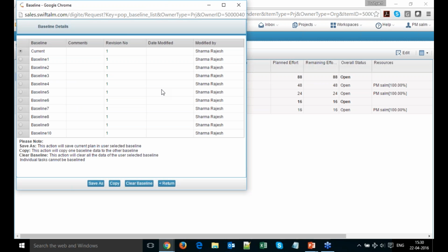The only limitation in using STaRT is that we don't have a selective baselining feature. What selective baselining means is that if you have added, let's say, 2 tasks in the plan and you have baselined them, and after entering the time, the actual end dates have changed. Now when I add a third task and want to baseline it, my previous 2 tasks will also get re-baselined instead of only task 3 that I've added. This feature is supported very well in MSP, but it is not there in the STaRT module.